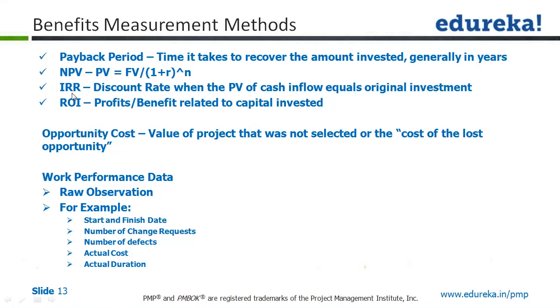The terms ROI and payback are very closely related. Payback very clearly means the time it takes to recover the amount invested, which is generally in various years. And ROI very clearly means a ratio of the profits related to the money invested.